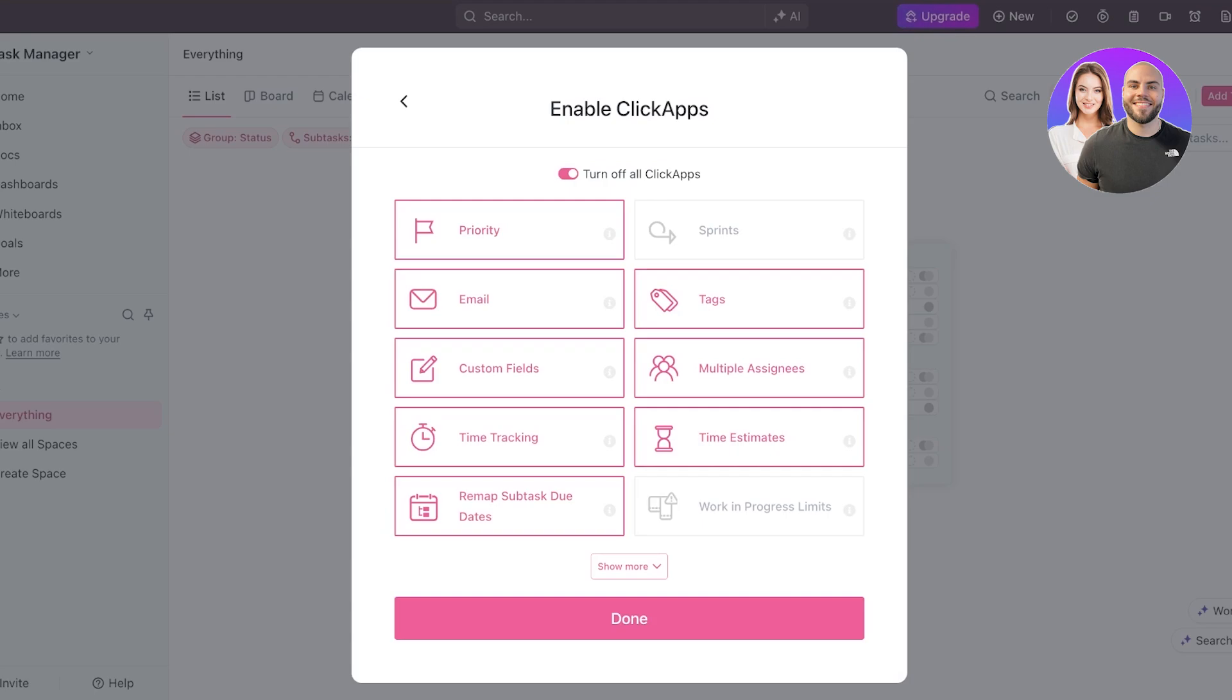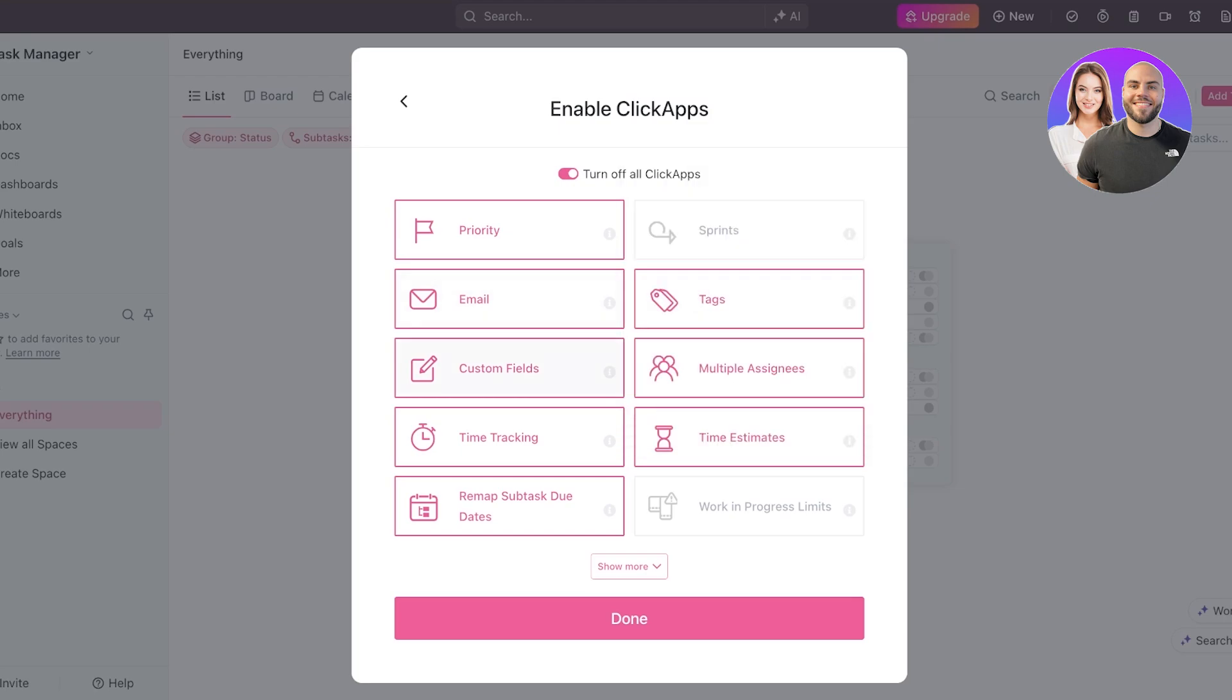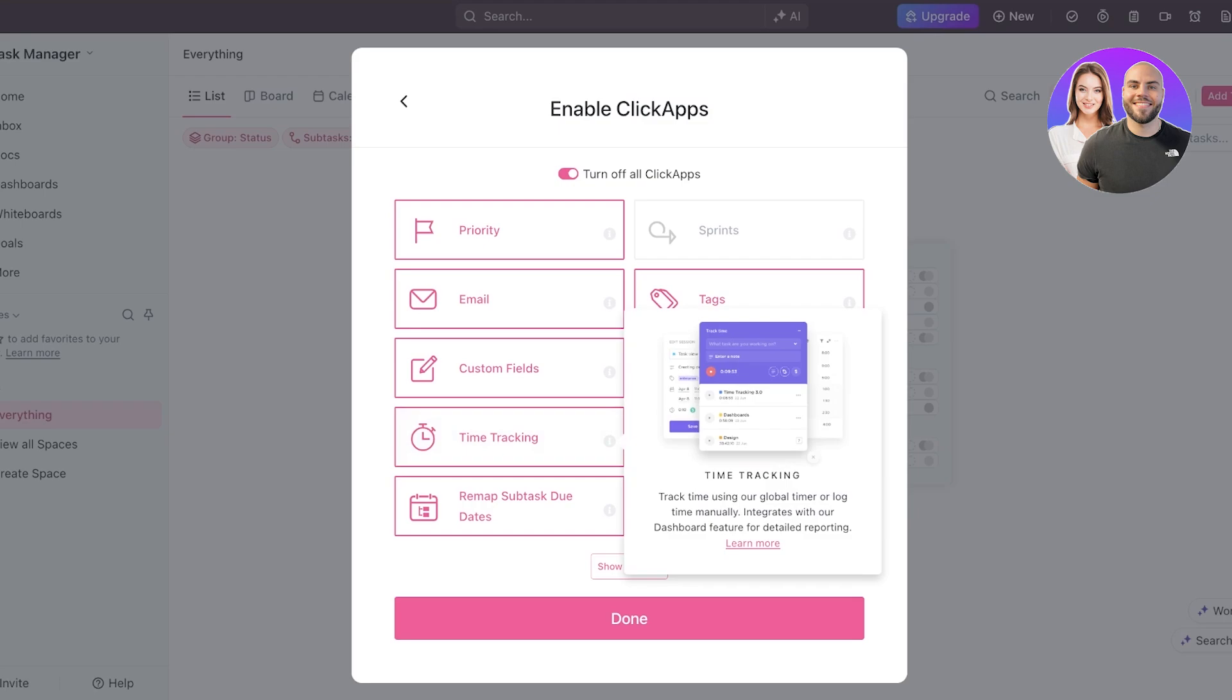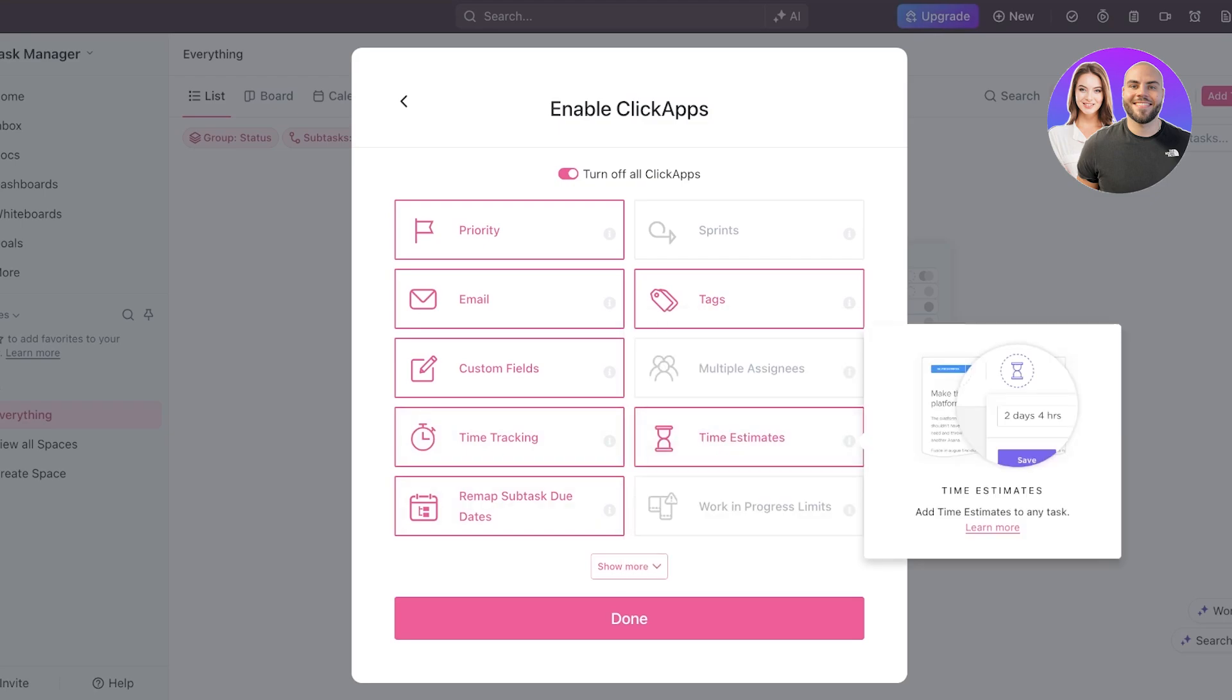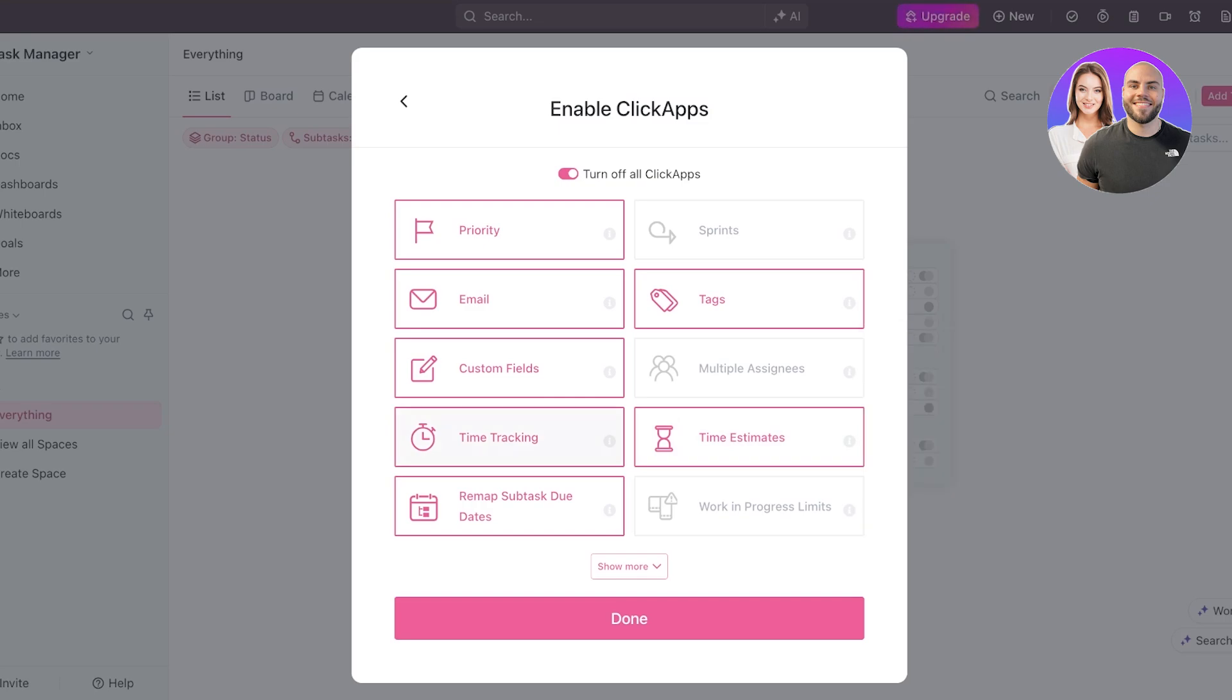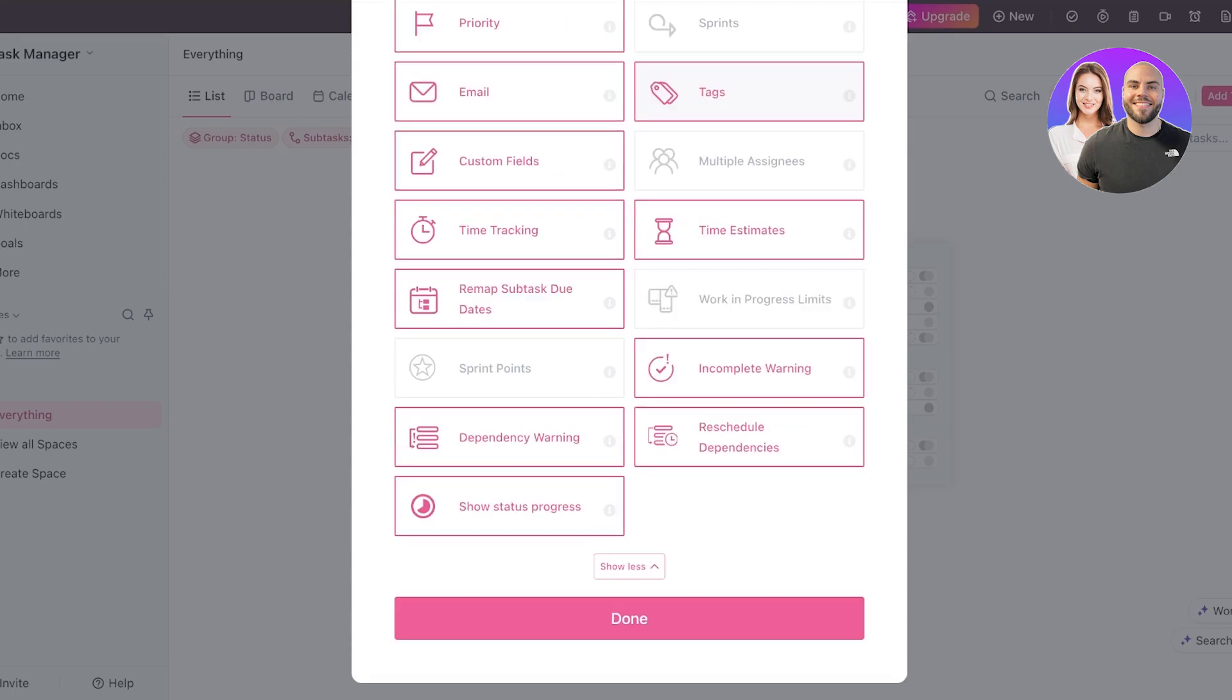After that, you have your click apps. So I do want priority. I do not need email functionality. But if you do, you can enable that. You can send and receive emails directly from ClickUp. You also have custom fields, multiple assignees. That is not something required for me. Then we have remap, subtasks, due dates, time tracking. I don't need time tracking, but I do want to use time estimates. Now, what's the difference? Time estimates allow you to estimate how long it's going to take you to accomplish something versus time tracking is more so used for worksheets when you're trying to log on time, when you're trying to make billable or workable hours.